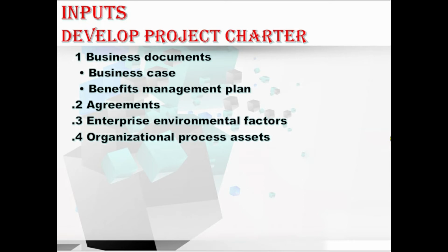It is also commonly used for decision making by managers or executives about the project decisions and levels. Typically, the business needs and the cost benefit analysis are contained in the business case to justify and establish the boundaries for the project. And also, this business case is created as a result of one or more of the following: market demand, organizational need, customer request, technological advance, legal requirements, ecological impacts, and social needs. Okay, hope you understood about these business documents.